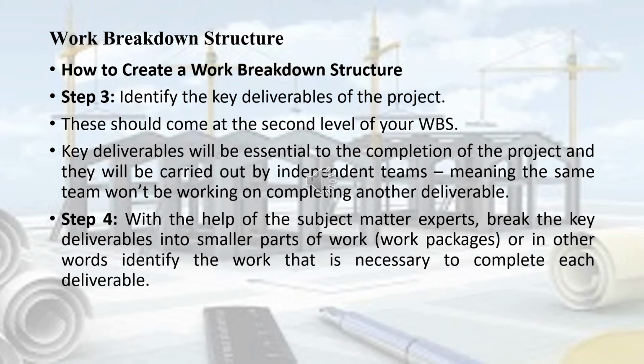So you have to do this together with the expert in the field, where you take your deliverable, you break it down into smaller deliverables, and you link them in a logical way so that at the end you can see the pieces coming together, that you're starting from A and you're going to Z in a logical way and as per the expert advice.